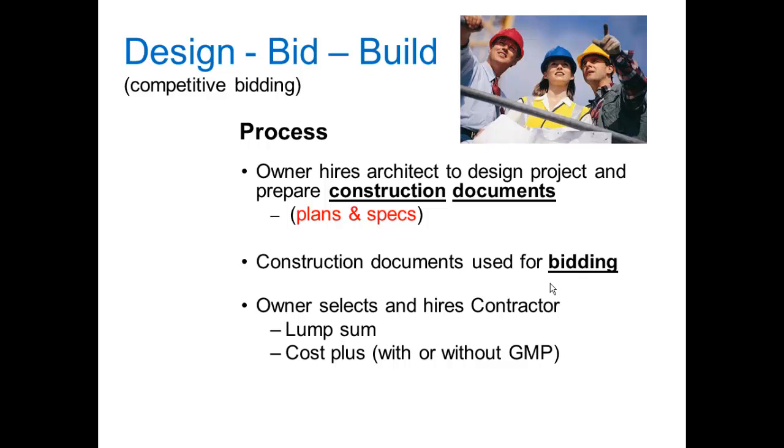So we'll look at design, bid, build, competitive. The owner hires an architect to design a project and prepare complete construction documents. Those include plans and written specifications. For every drawing component, everything on the drawing would have a specification to cover the information.